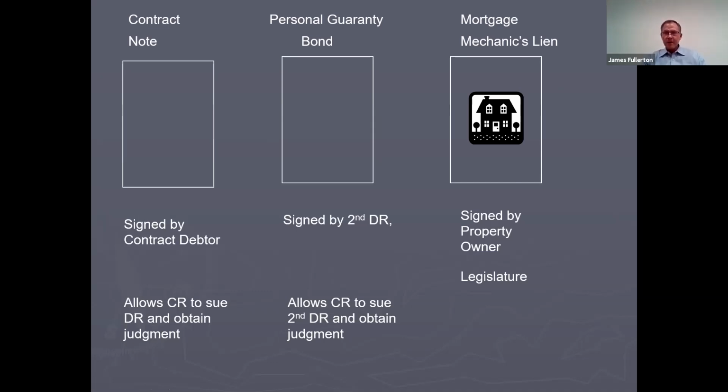The only bonds they can get are from weak bonding companies. So this is something I want you to be aware of and focus on when you're evaluating a project and how much money to lend. You want to think about who's the bonding company and look them up on Standard & Poor's or the A.M. Best company. There's a number of free websites that we'll get to later where you can look at the strength of that bonding company.